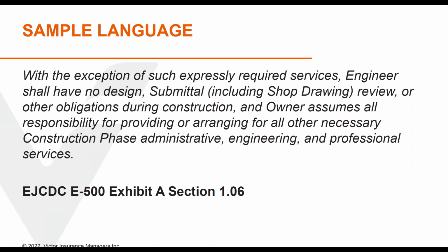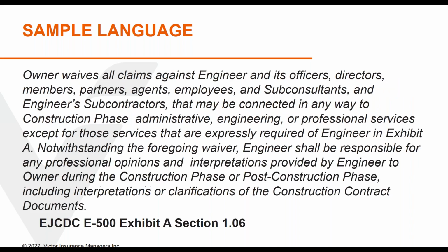It starts out by clarifying that with the exception of such expressly required services, you have no design, submittal, including shop drawing review, or other obligations during construction, and that the owner will assume all responsibility for providing these services during that phase. And then it goes on to, obviously, what you want to make sure that you have is a waiver of claims, recognizing that you do not have a responsibility for items that come up during the construction phase, as stated here.